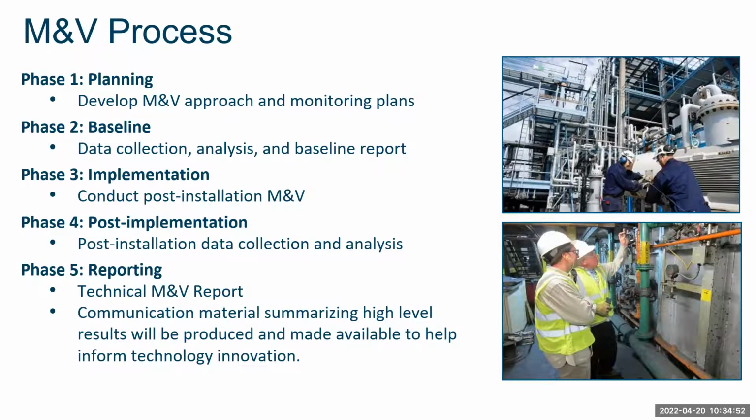The post-implementation side is about a year's worth of data. We want to collect a year's worth of data, maybe a little less, depending on the technology and what it's affecting. Again, this is data collection followed by some analysis to see what the new systems are doing. And then we go into the reporting phase, where we generate a big report that essentially captures all the evaluation work that we have done.